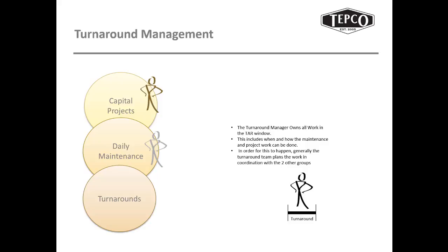Even though the costs are totally separate, I still have to integrate and control the day-to-day work in order for it to roll smoothly from a cost perspective and from a scheduling perspective. So if work is going on from two different perspectives, it makes for clutter, and where clutter is, there's confusion, and where there's confusion, dollars are being lost.